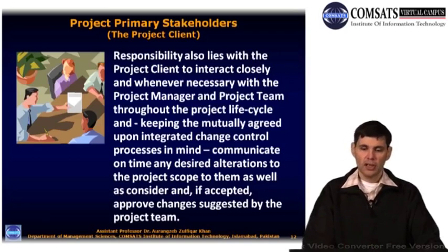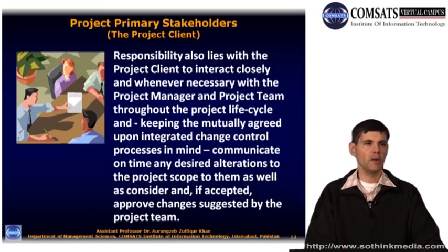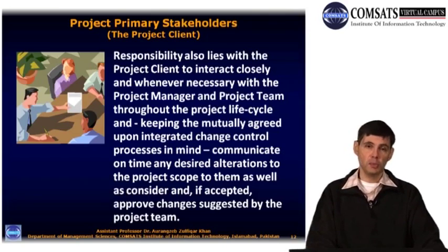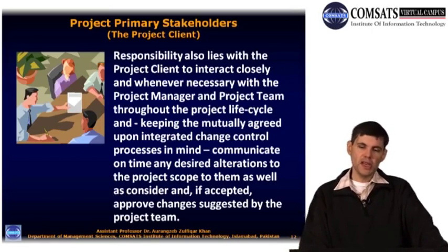Well, okay, if you have a plan to build a 6-story building, and now the client comes and says, no, I don't want a 6-story building, I want a 10-story building. Well, that is quite a substantive change request. That has cost implications for the project. That has got schedule implications for the project, and may have risk implications for the project, legal implications, etc., etc., etc. So all these have to be kept in mind.